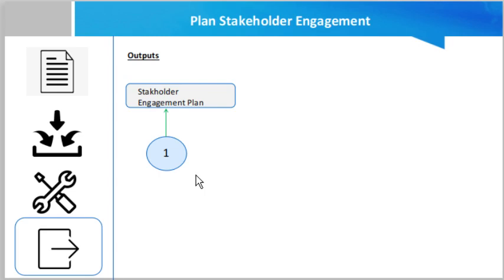Involvement means that you can describe, for example, that every week you can have a meeting with them, an on-site meeting with the project manager, or if things are not resolving, you can have a steering meeting on a monthly basis or every 2 weeks. Then you must see how you will involve the stakeholders in your project and what information you will give them. You will give them status reports and inform them about the issues. You can involve the stakeholders in risk meetings to identify risks, so that they know the possible risks in the implementation of the project.